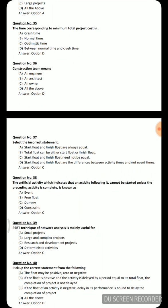Next question: Select the incorrect statement — Option A: start float and finish float are always equal. Option B: total float can be either start float or finish float. Option C: start float and finish float need not be equal. Option D: start float and finish float are differences between activity times and not event times. The incorrect option is option C: start float and finish float need not be equal.